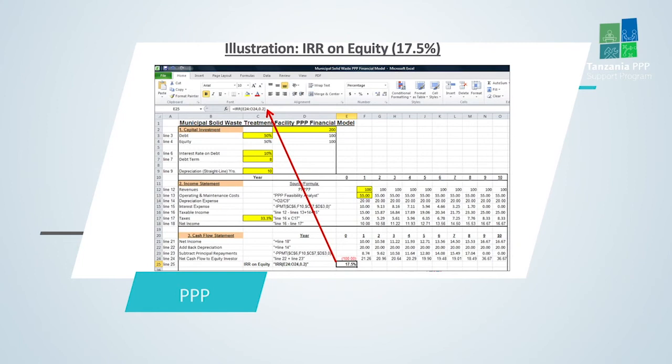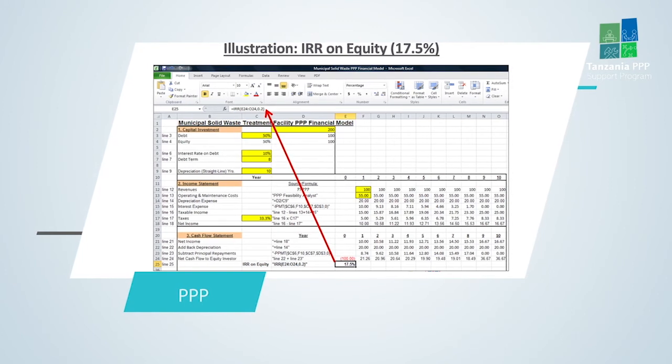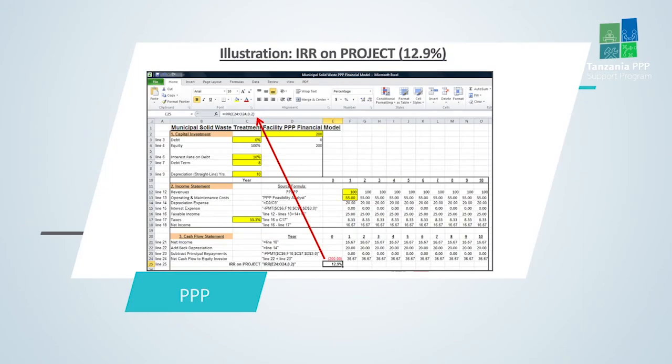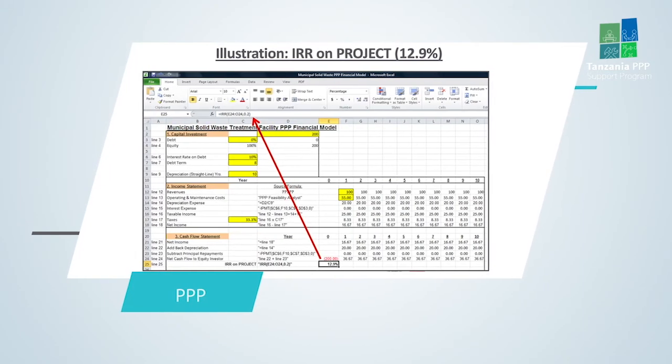So when we have an investment and refinance rate of 12% as given, then the MIRR drops to 14.6. Again, what you want to do is show all of these measures. You want to show the traditional IRR, the project IRR, the modified IRR, and the debt service coverage ratio. You want to get the whole picture of the project.